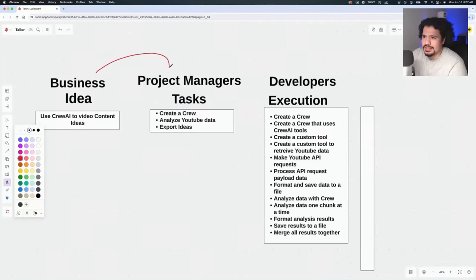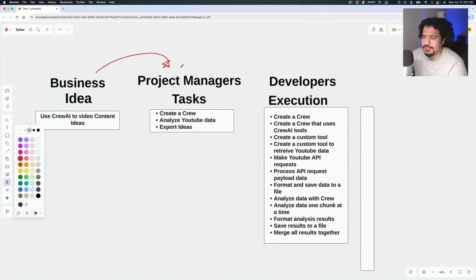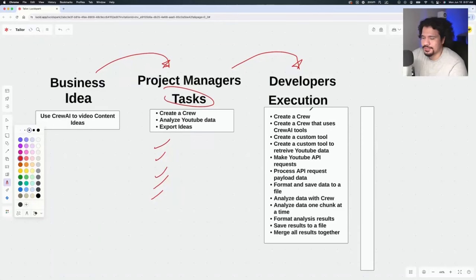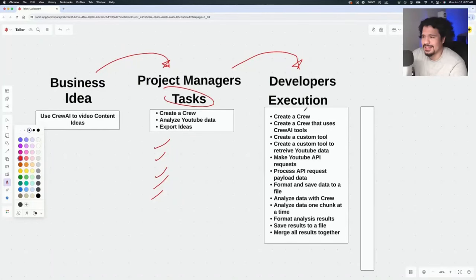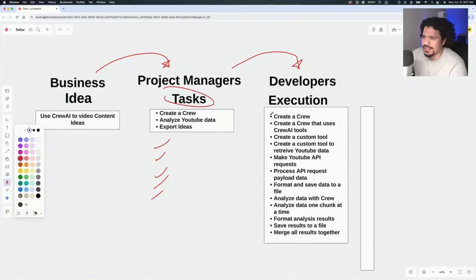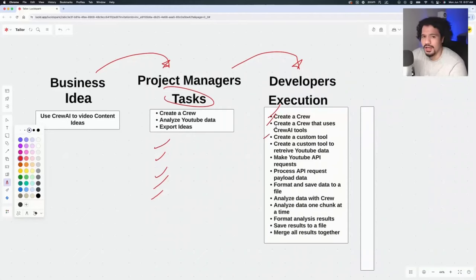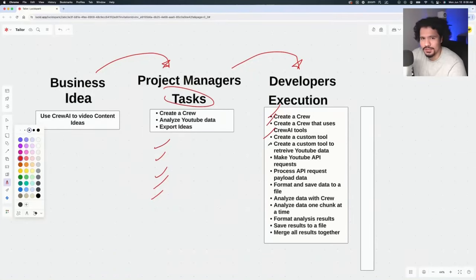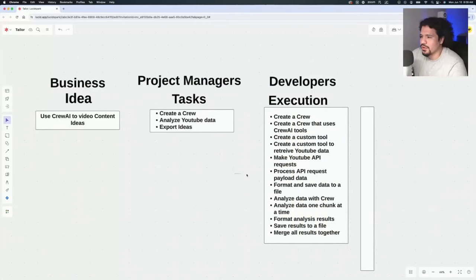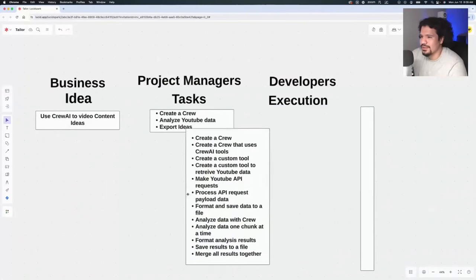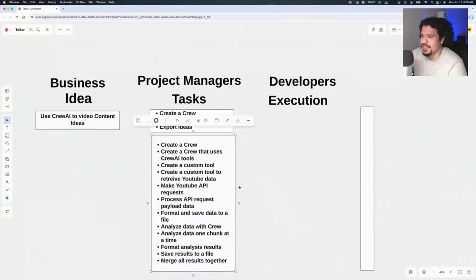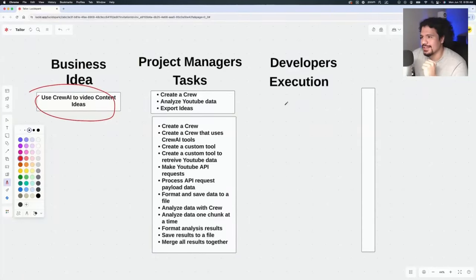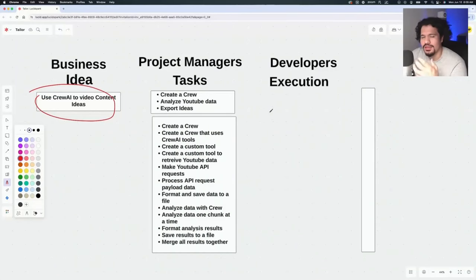That's pretty much the workflow for a lot of these tech companies. The business makes a request, they send it to the project managers, the project managers then go down and start writing out the details of all the things that need to be done in order to complete the bigger task. Once they have that better defined, they will then pass that on to the developers. This way, instead of giving the developers a really big task that has to be completed within a long time frame, they're then given smaller tasks that can be completed two weeks at a time, one week at a time, depending on how long your sprints are. The benefit of this is that it helps you track progress more accurately and really helps build out momentum, especially if you have a challenging task, because you want to be able to figure out what all these tasks are going to be before any of the work starts. The smaller the pieces that you can break down this big idea into, the more time that the developer is going to be able to spend actually making the thing rather than trying to figure out what the next steps are.